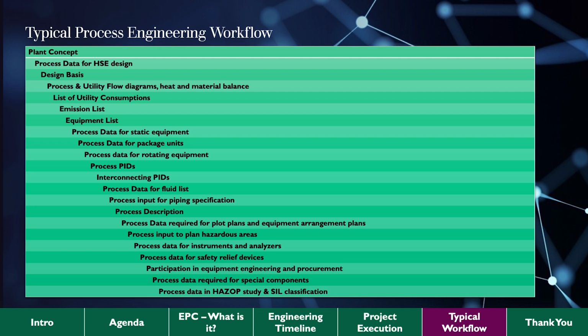And as you are moving through each one of these steps, it's critical that they are being done correctly, because if you come later to change something, all that is going to cost too much money. It depends, of course, where you are. If you are talking about, for example, the Middle East or Asia, out of the EPC, the engineering is the most expensive part. So it really matters to get that done correctly.